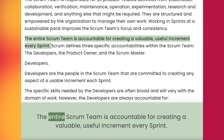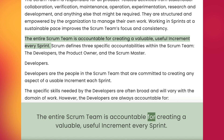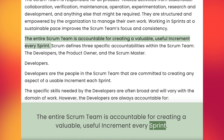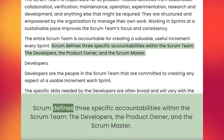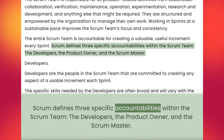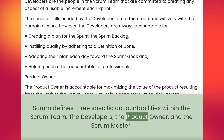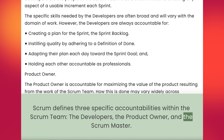The entire Scrum team is accountable for creating a valuable, useful increment every sprint. Scrum defines three specific accountabilities within the Scrum team: the developers, the product owner, and the Scrum master.